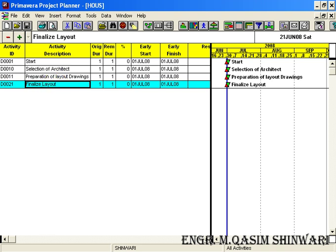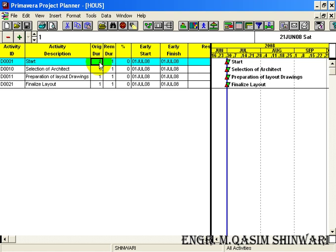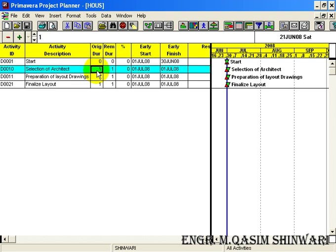The original duration - the original duration of Start is zero days and that of Selection of Architect is seven days.